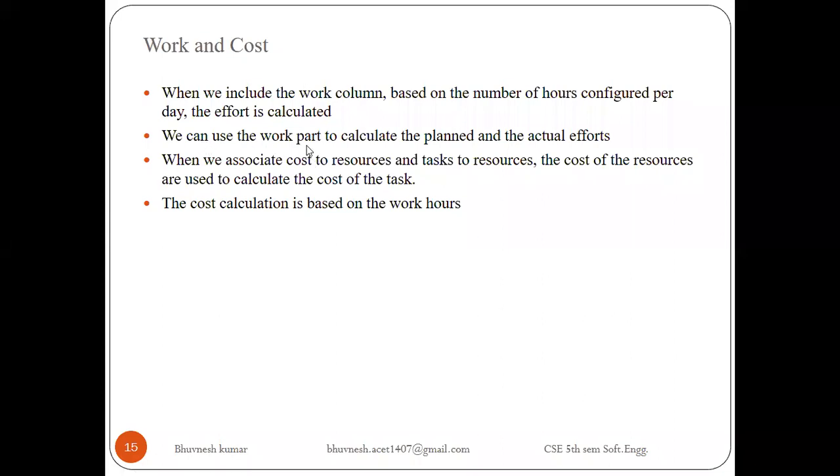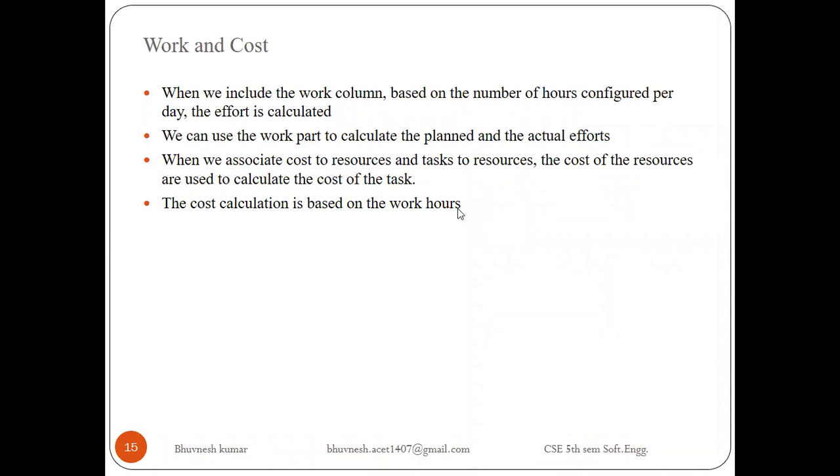Then we can use the work part to calculate the planned and actual efforts. Then we have to associate cost to resources and tasks to resources. The cost of the resource is used to calculate the cost of a task also. The cost calculation is based on your work hours. That's all the concept of how we will track our project. Now I will show you how all these concepts are performed in OpenProj.